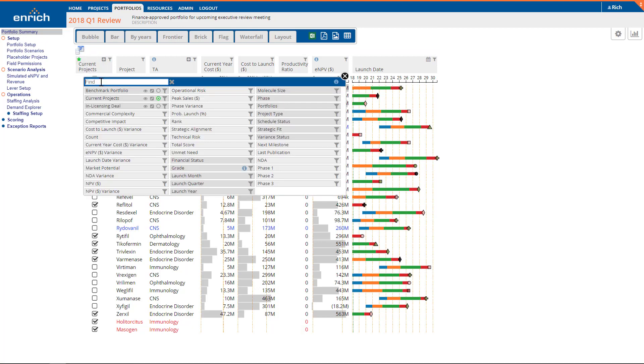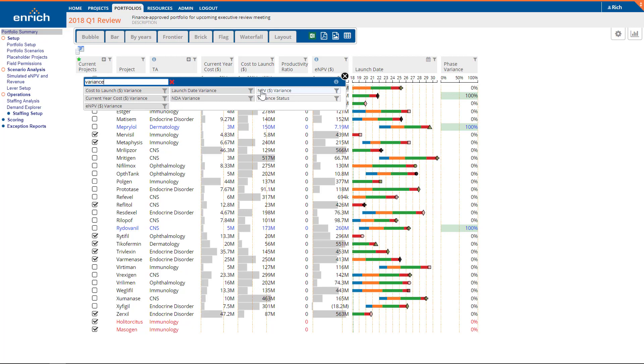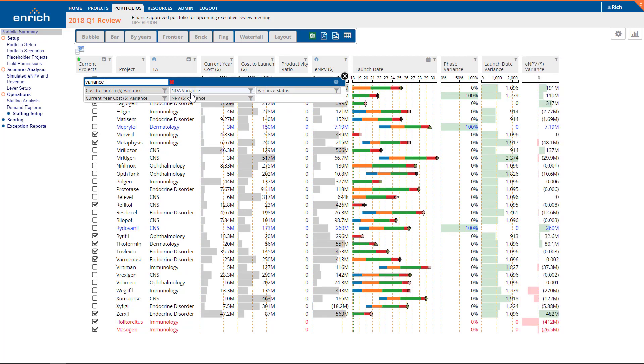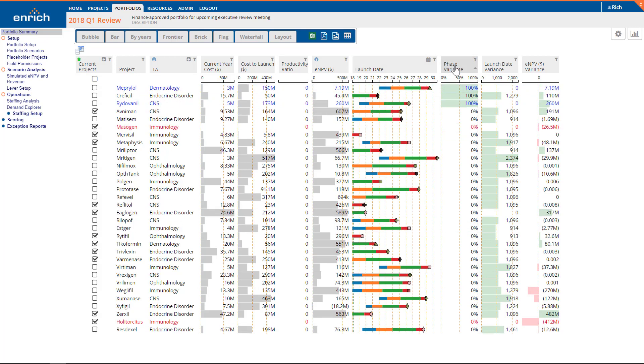All variance columns are suffixed with the word variance. Your EnrichAnalytics instance can be configured with variance columns for numeric items, dates, and even text fields. Date variance is shown in days, text variance is shown as a percentage score, and numeric variance is shown as a difference. Numeric fields encode changes in red and green to make variances easier to see.